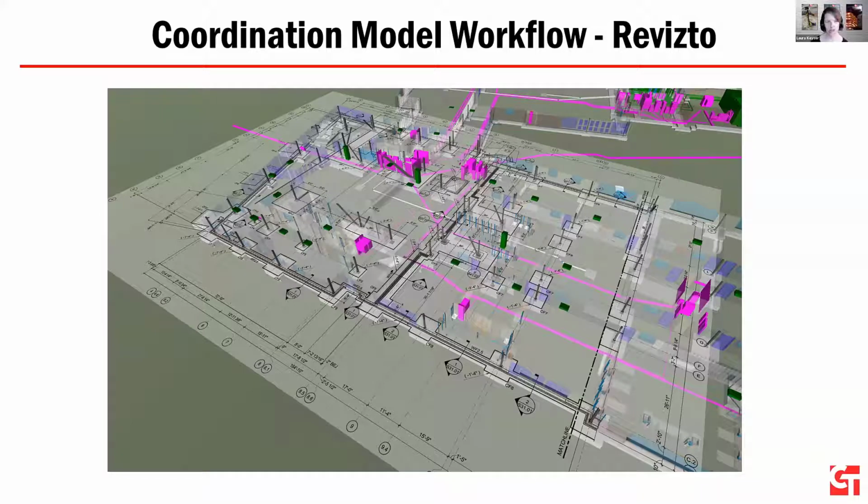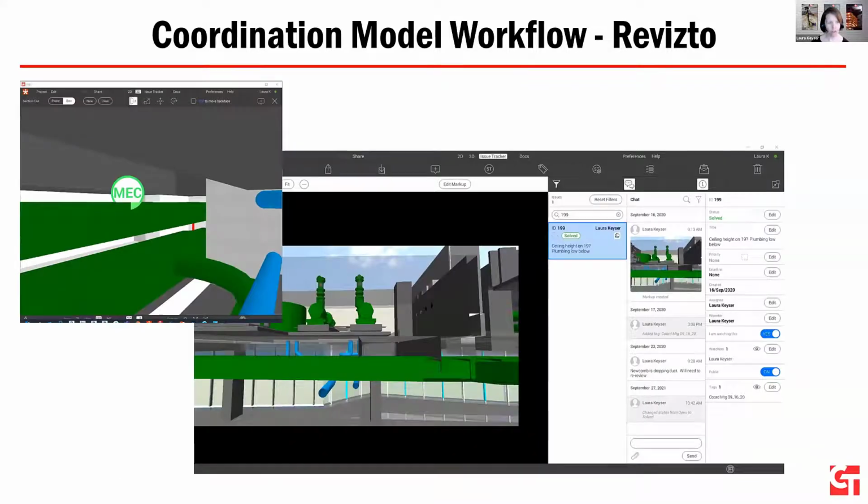It gives us a really good picture of what's going on. We can really easily go through in a meeting. So when I'm running a coordination meeting, I can stamp that this mechanical duct here has an issue with something, and then I can go and fill in information. This ends up turning into an attachment to our meeting minutes. So we can keep a running conversation.